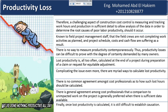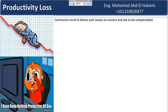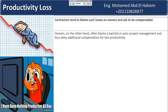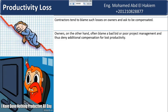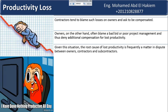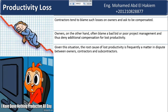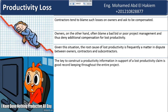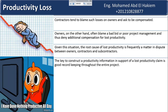Once lost productivity is calculated, it is still difficult to establish causation. Contractors tend to blame such losses on owners and ask to be compensated. Owners, on the other hand, often blame a bad bid or poor project management and thus deny additional compensation. Given this situation, the root cause of lost productivity is frequently a matter in dispute between owners, contractors, and subcontractors. The key to supporting a lost productivity claim is good record keeping throughout the entire project.